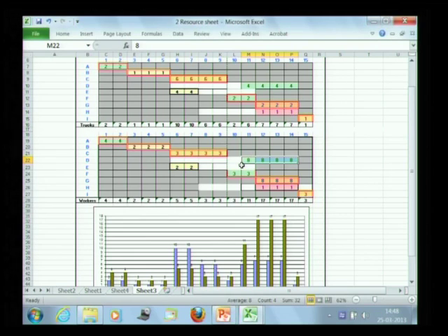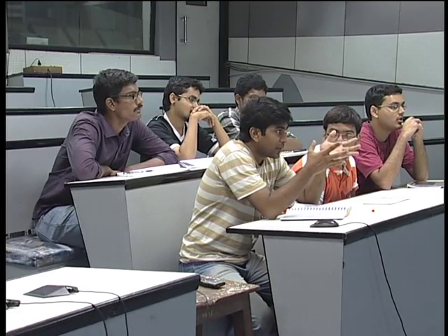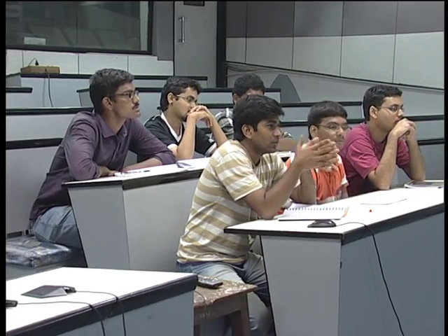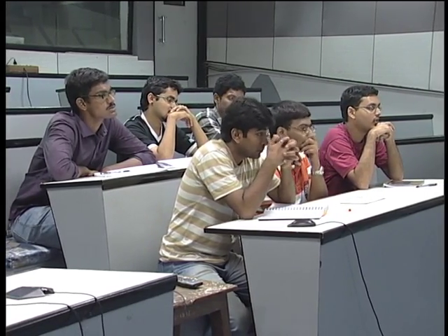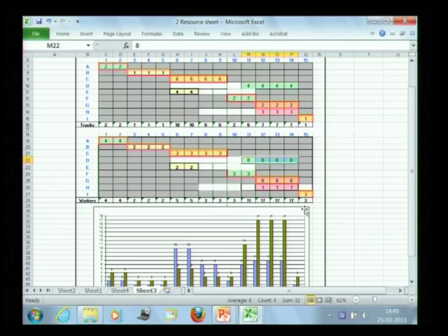If both the resources are in relation, in a spreadsheet we can replace one with other. Absolutely, I could just use a factor for that. Right now they are not necessarily related. For example, some might require 4 workers to load up a truck, other one might require just a forklift operator, you might just need one depending on material or what you are using. So right now we are assuming there is no real relationship, but you have seen the problem I am bringing up: there are 2 resources, and resolving the over allocation of one now causes over allocation of the other.